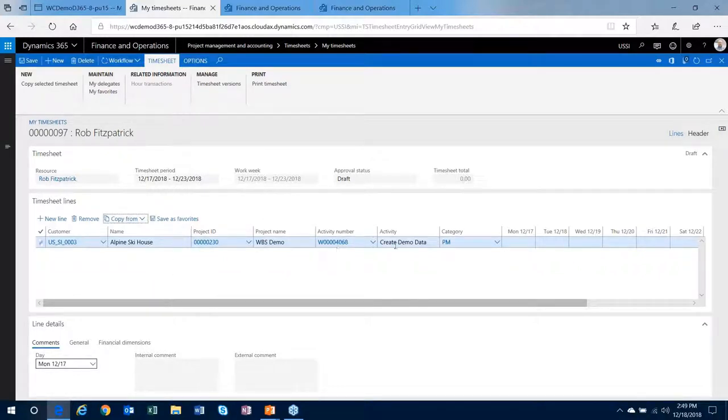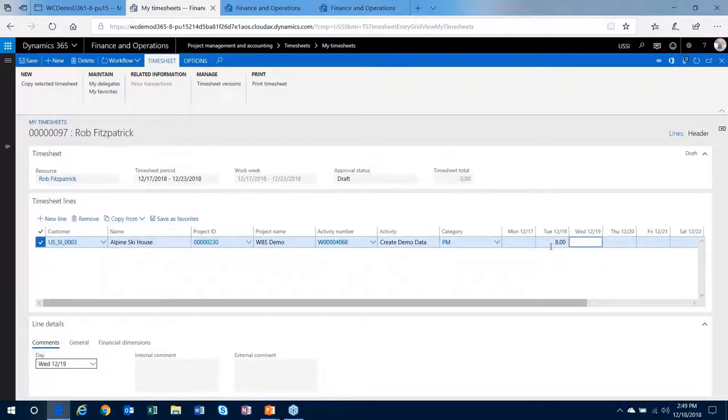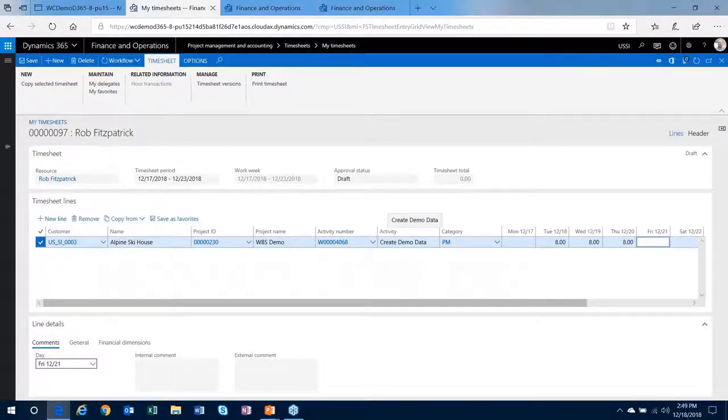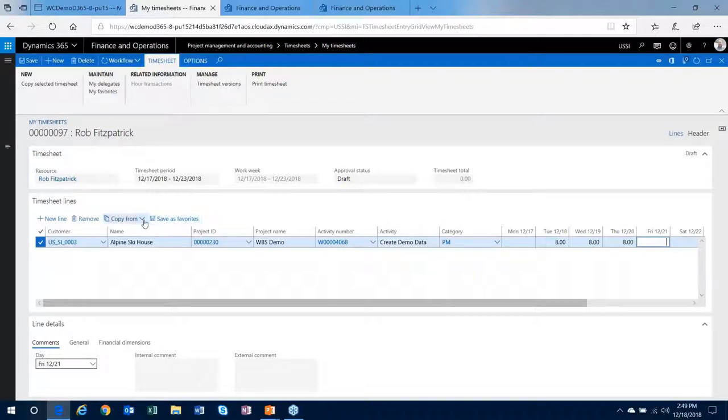So that task for me creating demo data on the 18th, I can then just go and key in the time against that. It saves me the data entry. So yes, definitely one of the cooler features is that if you're assigning resources to tasks in the work breakdown structure, it facilitates data entry on the timesheet side where I can just copy them directly and save some time for the people filling out timesheets.